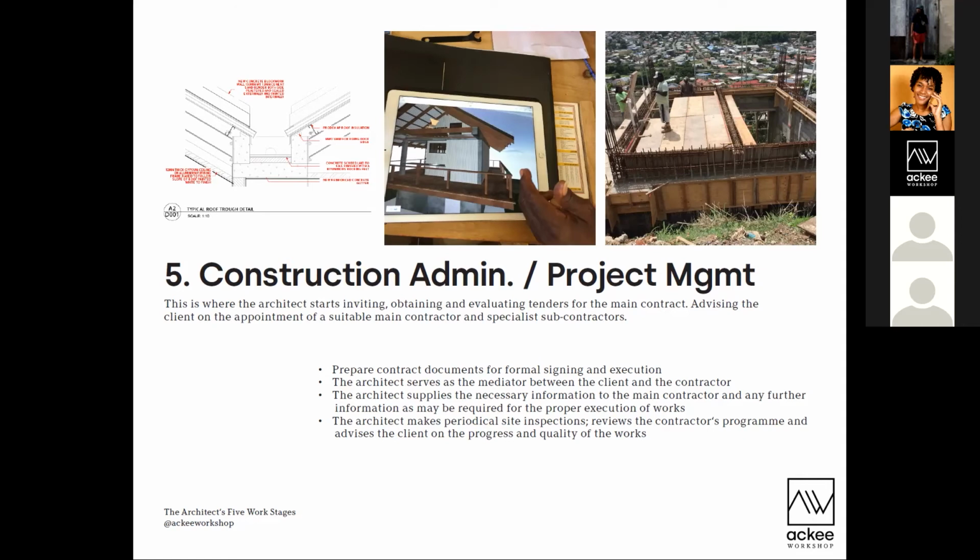Trying to understand the fees that are going to have to be absorbed, whether it be through the contract or the client, and making sure that that is resolved, and also communicating and being as transparent as possible with the client to say, well, the contractor had a boo-boo here, they're going to need an extra week to do this, but they are absorbing the cost of it because it was their error. Okay, and I think that's pretty much it.